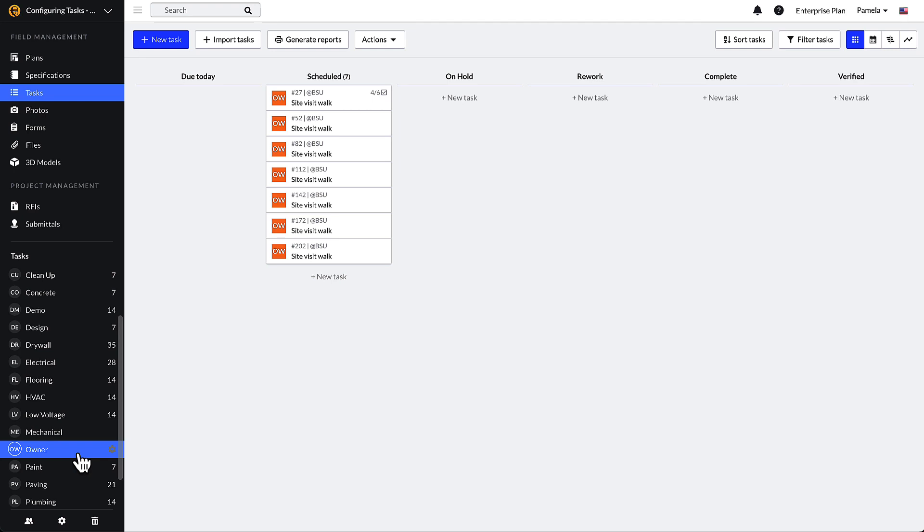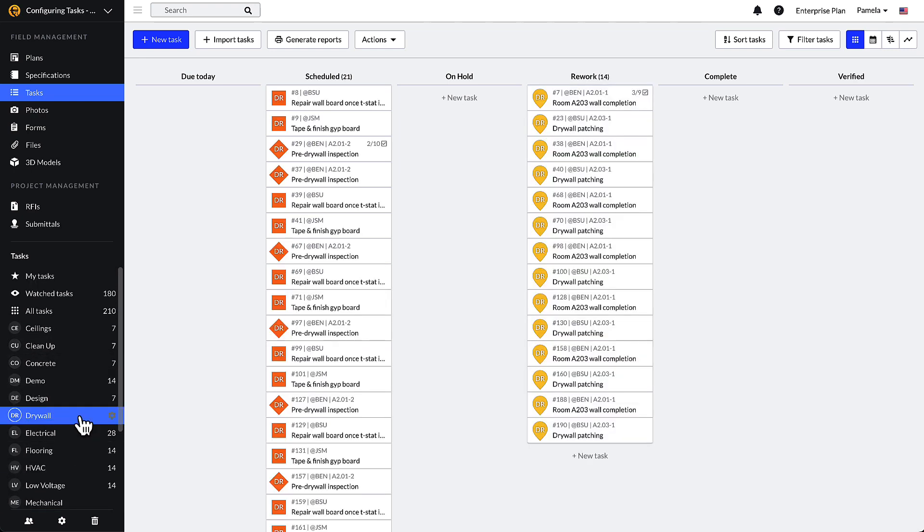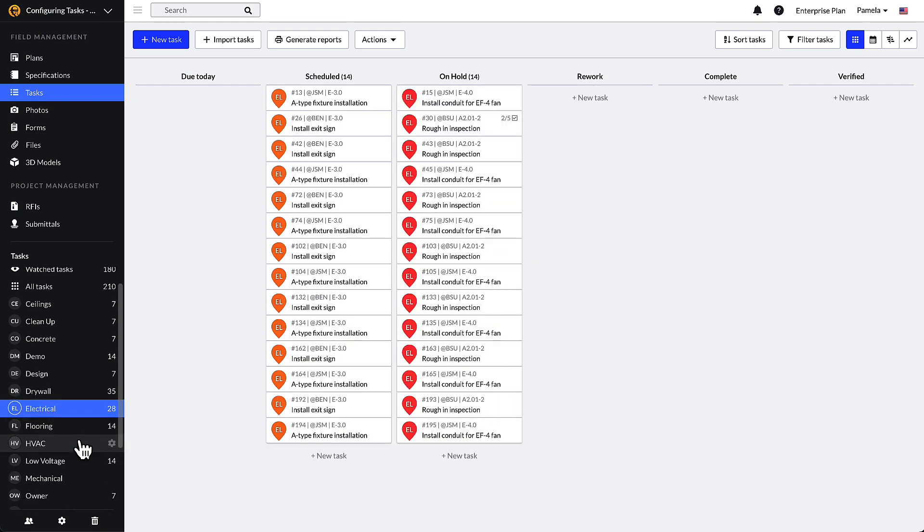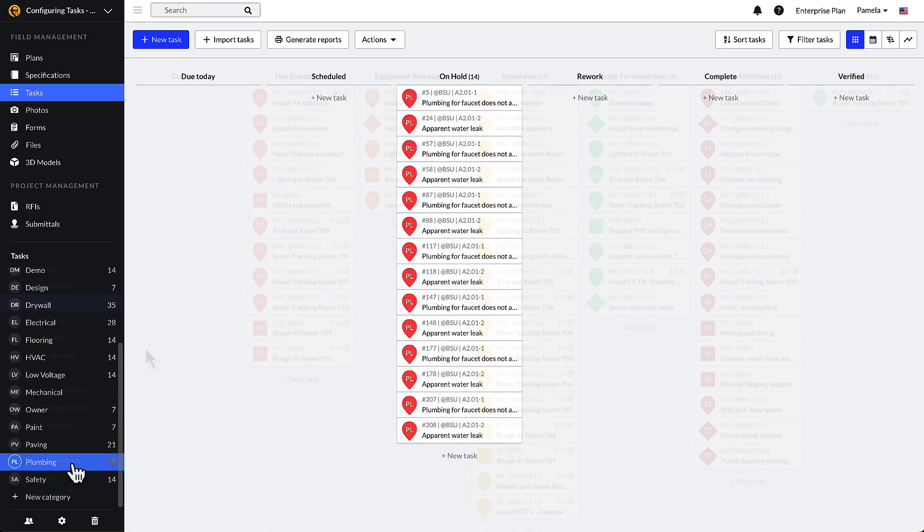Categories can be created in a few different ways. As an example, general contractors often define categories by the various trades on the construction project. They may include drywall, electrical, mechanical, and plumbing.